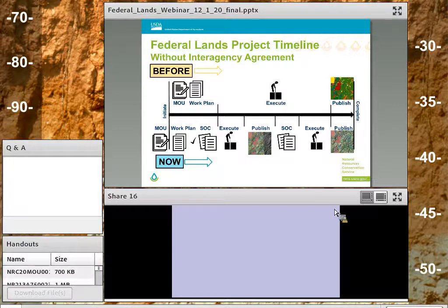We can also look for ways to subdivide the project based on different needs in different areas or the ability to progressively publish a project. And the statement of commitment can be amended as the nature of the project changes. Let's say we go from an office of 4 to an office of 1, or if there are some sort of clearance policies that change through the project. And again, this process can apply to any kind of project.